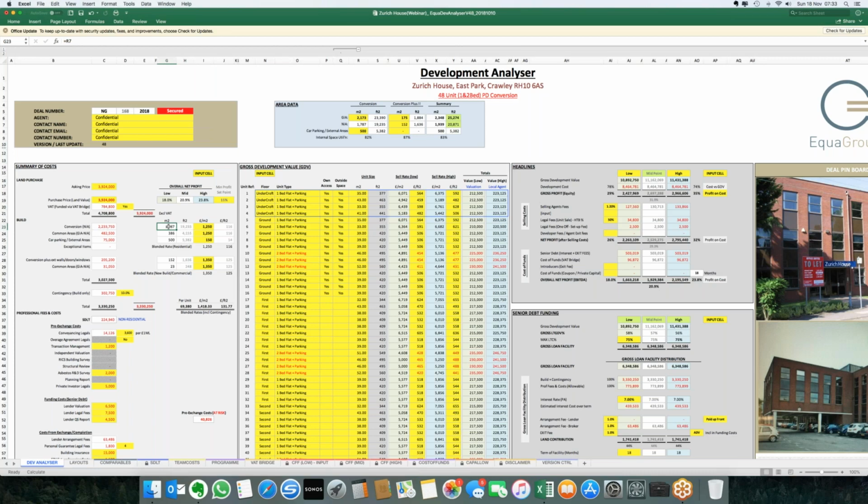So it doesn't take into account corridors. It doesn't take into account the entrance lobby, lift, maintenance area, risers. That's all communal space. So this is just looking at the NIA, the net internal area. So you can see here we've got 1,787. If we were to total all of these flats up, we actually get to a higher number. But the reason there is that on this particular one, I've split out the rates.